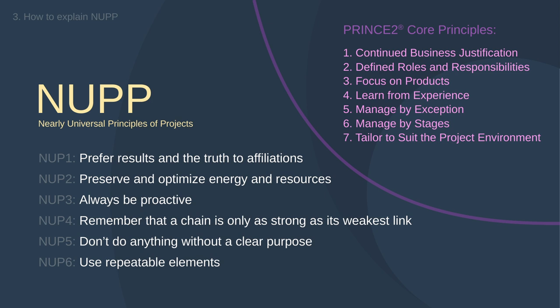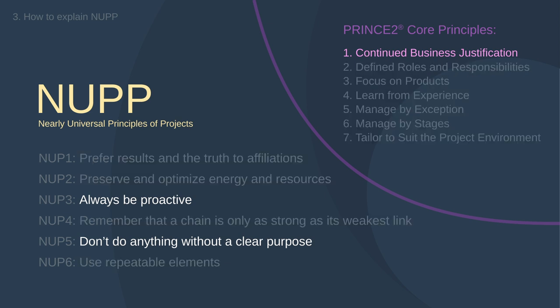Now let's compare NOOP principles with Prince2 principles. One obvious difference is that NOOP principles are more general and high-level, while Prince2 principles are mainly designed to support how Prince2 works. The first Prince2 principle — continued business justification — is basically one aspect of the fifth NOOP: don't do anything without a clear purpose. The project's justification can be derived from that fifth NOOP, and the idea of not continuing a project that loses its justification is about being proactive — the third NOOP.